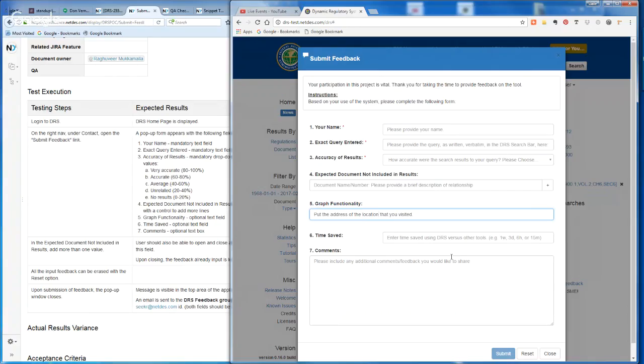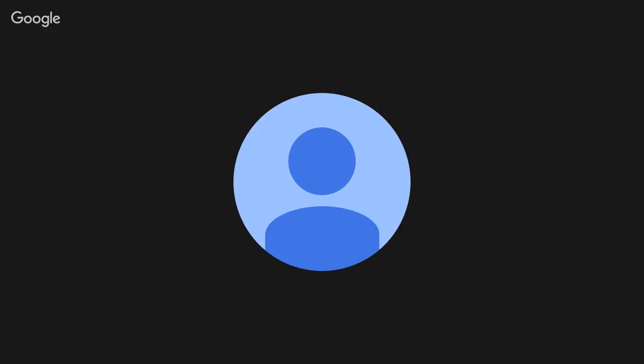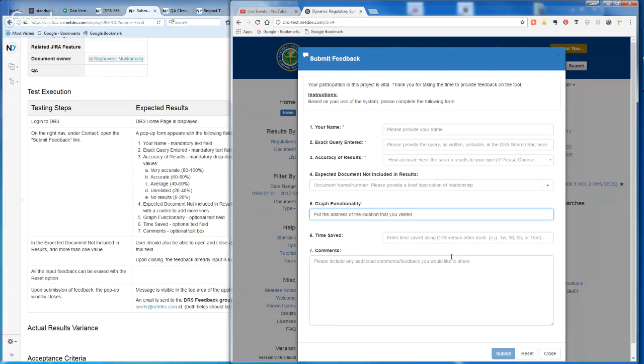So there's a change in the requirement, and that decision had to be approved by the PM before the developer is allowed to do this. The PM has to have signed off on something that needs to be attached to the story so that I know the story modifications are approved. Because there's nothing to stop a developer from going in there and putting in the story whatever it was that he built, just so it passes.